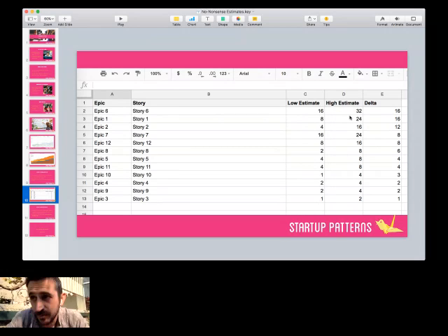So you're kind of forcing yourself to prioritize the discussion around the stories that we have the least amount of information on, as indicated by a huge delta in low and high, and iterated on that several times. You can do this within an hour or two. This isn't like a huge long process. It just forces the team's attention on those stories with the widest delta, right? So then we've got our estimates, closer in ranges.